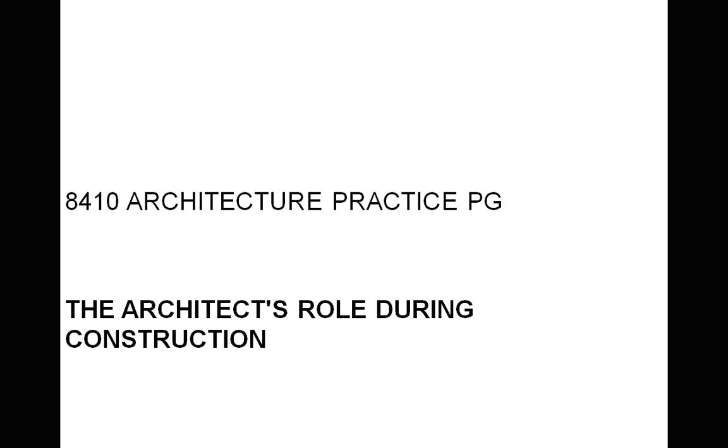So just to clarify what we were talking about last week, in terms of cost plus projects, cost plus is allowable everywhere, providing that one has a specific cost plus construction contract. That's what I've since found out, and I think I was confusing myself because the standard progress payment stages that one has in Victoria are in the Building Contracts Act. That doesn't exist in the ACT and New South Wales, where it's just a recommended thing. So that's the difference between Victoria and New South Wales and the ACT: there's no legislated default progress payments for domestic projects, whereas there is in Victoria.